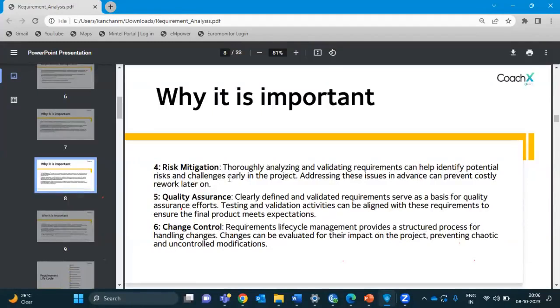Now, risk could be anything. There might be no resources, or maybe a shortage of resources, so you know that risk. Maybe after features A, B, C, there is a requirement of a high-end developer, but we don't have one. So you might want to start searching before, maybe at the beginning of the project. So understanding what risks there are is very important.